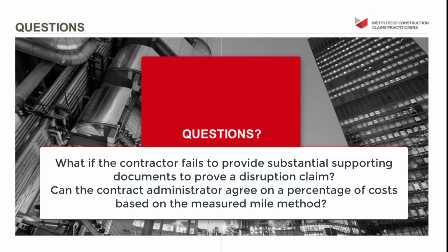So if you don't provide good enough records in substantiation, it's very difficult for your claim to succeed. And it's also very difficult for you to try and say that the contract administrator has failed in his or her obligations under the contract. And that's, as I mentioned in the webinar, quite a common defense from a contract administrator, which I'm sure a lot of you have encountered.